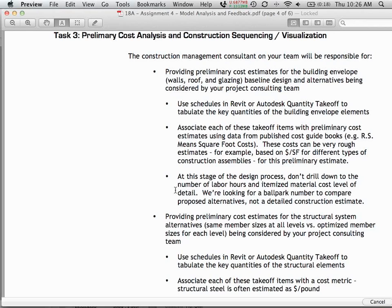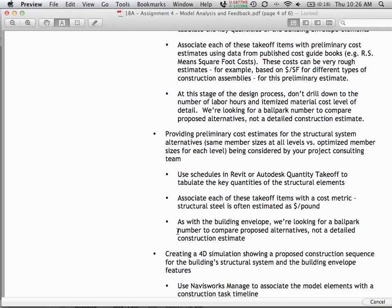Help the team with costs for different building envelope systems — compare the baseline EIFS wall system against super-insulated structural panels. For the structural system, steel is typically estimated by dollars per pound, since that's how it's actually priced. Work with the structural model to construct a schedule showing the weight of all the steel in each element, then come up with a notion of really how much it would cost — or how much you'd save by optimizing the steel — versus going with a uniform system across all levels.